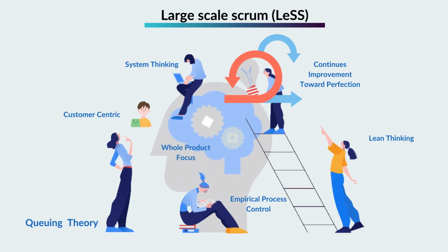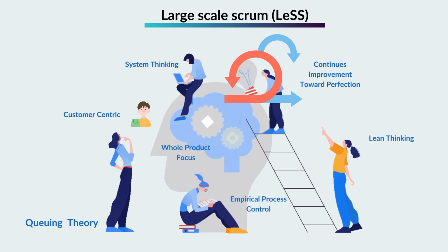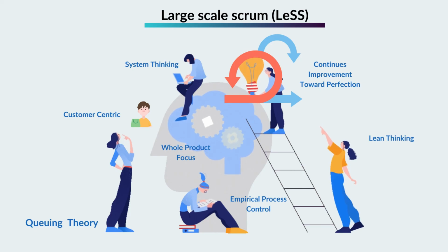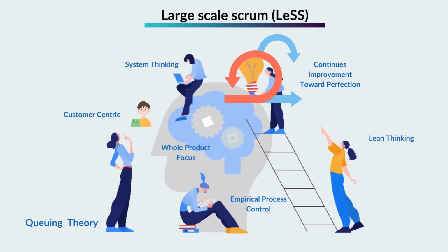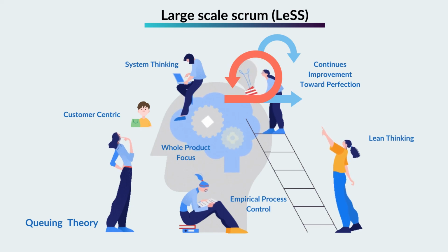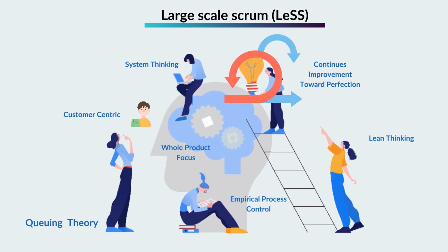The LESS framework introduces PBR, Product Backlog Refinement, meeting. The PBR meetings expand the sprint planning to the area of focus by parallel LESS sprints. The main activities involved in the PBR are: breakdown of big items, clarification of the outstanding questions, estimation of stories, risk and dependencies identification and mitigation.